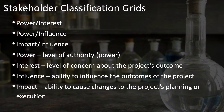Another common classification technique is the stakeholder classification grid, which comes in several forms — the power-interest grid, the power-influence grid, and the impact-influence grid. These grids show two axes and measure the stakeholder's level of power, influence, or interest, and map them accordingly. Power is the level of authority or official power within the organization. Interest is the level of concern about the project's outcomes. Influence is the ability to influence project outcomes, while impact is the ability to cause changes to how the project is planned or executed.